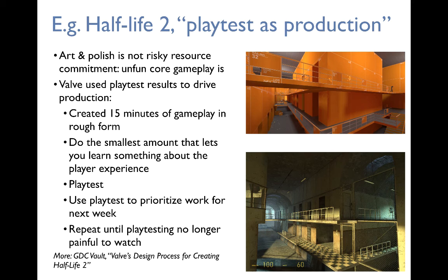So what they said is, well, let's develop something that is playable gameplay first, see whether it's fun, iterate on it until it's fun, and then when we know it's fun, we can tell our art asset production and our polish team to polish the game into that, because we then know this is going to be a great level. So Valve basically used producing shippable gameplay and playtesting to drive their own production process.